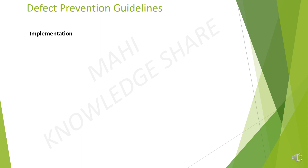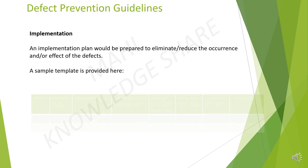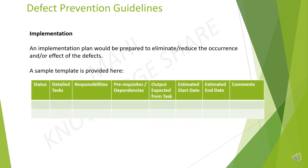Implementation. An implementation plan would be prepared to eliminate or reduce the occurrence of defects. A sample template is provided here. The implementation plan should have: status, detailed tasks, responsibilities, prerequisites or dependencies, output expected from task, estimated start date, estimated end date, and comments.